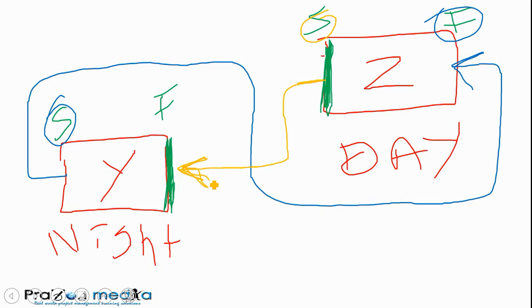And for that reason, if I said night guard 1 must start before night guard 2 can finish, then that's okay. Or if I said night guard 2 must start before night guard 1 can finish, there's nothing bad in that either. It really depends on what you're trying to convey, but always look out for the direction of the arrow and always look out for the terminology and the definition that's used.